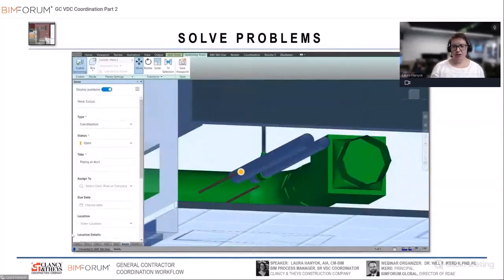We've also used this, we're not only doing this type of model review during construction, we are also doing it for constructability reviews. We are contractually obligated on all of our public school work here in this county to do a constructability review at different stages during design. So VDC is engaged during construction documents, in two different phases, to do a model review.